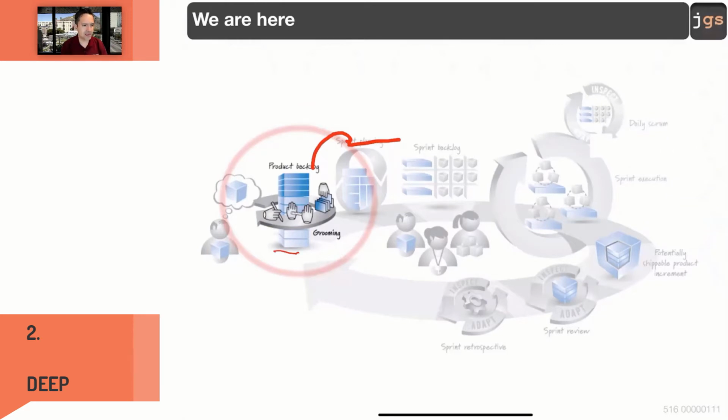So think about it. There is in the middle of the room a stack of different things that need to be done. And suddenly with your team, you are going to pick some of them, the ones with highest priority, hopefully, and you're going to commit to complete that subset in 1 or 2 weeks. And that subset becomes your sprint backlog. Sprint backlog, what you're going to do in 1 or 2 weeks. Product backlog, the big database, the big stack with everything that needs to be done.